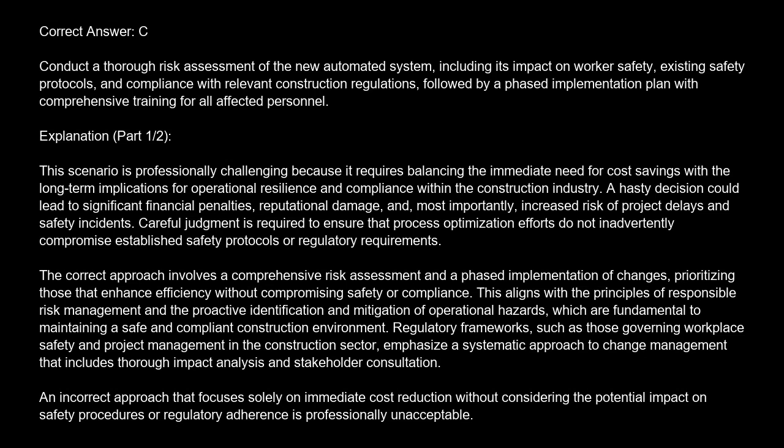The correct answer is C. Conduct a thorough risk assessment of the new automated system, including its impact on worker safety, existing safety protocols, and compliance with relevant construction regulations, followed by a phased implementation plan with comprehensive training for all